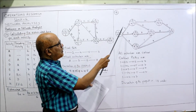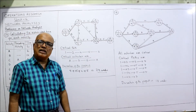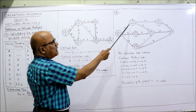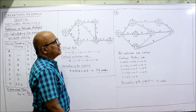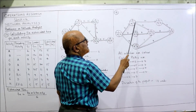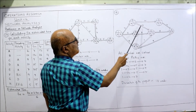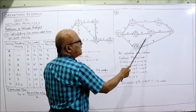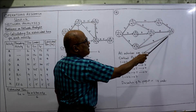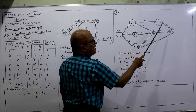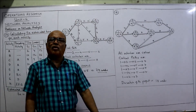Time estimates: 1→2 is 4, 1→3 is 7, 1→4 is 9. EST forward pass: first value is 0. Only one arrow merging: 0 + 4 = 4; 0 + 7 = 7; 0 + 9 = 9. One arrow merging: 4 + 10 = 14. Three arrows merging at node 5 — take maximum: 4 + 6 = 10, 7 + 3 = 10, 9 + 1 = 10, all equal 10. Three arrows merging at node 7: 14 + 4 = 18, 10 + 8 = 18, 9 + 9 = 18. Forward pass completed, EST = 18.